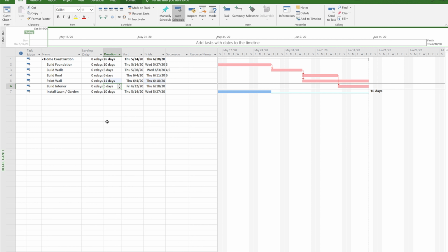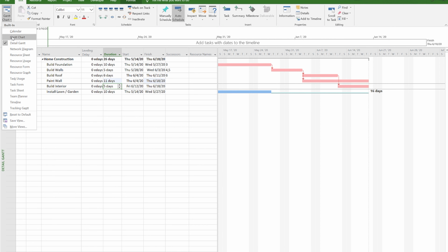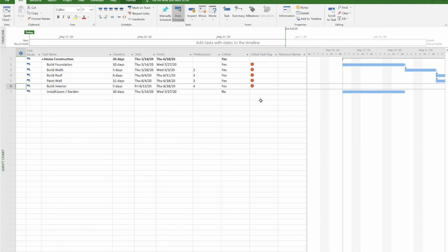So those are some of the ways where you can identify critical tasks and utilize the flag that I showed in the Gantt chart to identify the task that has some buffer to play around, and the task that cannot be modified because, for the time being, painting a wall now became a critical task, because from 4 days now it needs 11 days, even though it's not dependent on other things.